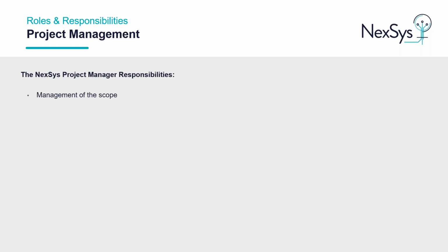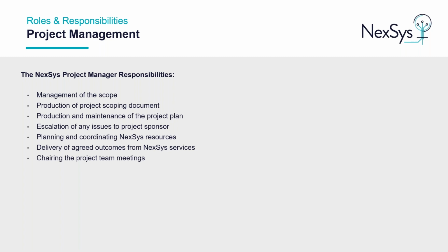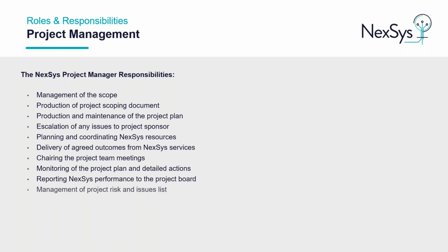The NexSys project manager would be responsible for management of the scope, production of the project scoping document, production and maintenance of the project plan, escalation of any issues to the project sponsor, planning and coordinating of NexSys resources, and delivery of agreed outcomes from NexSys services, chairing the project team meetings, monitoring of the project plan and detailed actions. This will include making any minor amendments to task timings, priorities as a result of short-term or unforeseen resource limitations. Reporting NexSys performance to the project board, management of project risks and issues list, and represent the NexSys project team on the weekly project meetings.